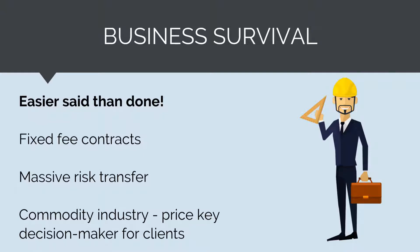On top of this, construction contracts usually involve significant risk and responsibility transfer to the contractor, meaning the contractor is responsible for all sorts of known unknowns and unknown unknowns, and it's their responsibility to manage and budget for these. Finally, construction contracting is often seen as a commodity industry where contractors are selected primarily based on price. Clients often see little difference between contractors' offers other than what they quote, meaning the contractor who has under-quoted and under-estimated risks is likely to win the project.